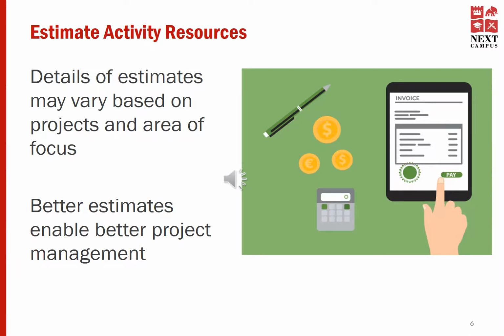In Agile, this is emphasized further. As you know, in Agile context, we do not sign a very detailed, complete requirement specification for a bigger project. What we do is progressive elaboration. We work on small chunks and deliver them. As we move on, we adjust the scope and ensure that the bigger picture is being met.